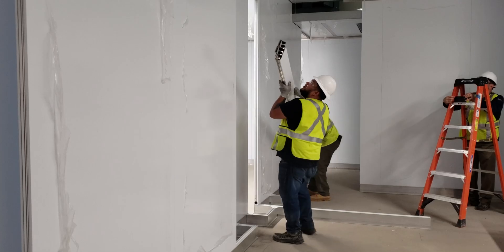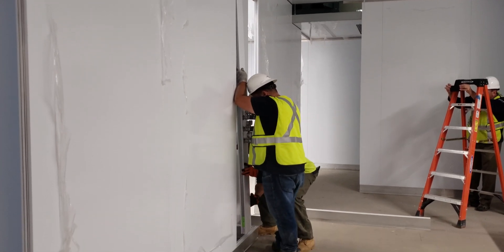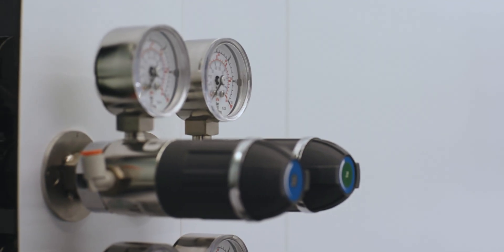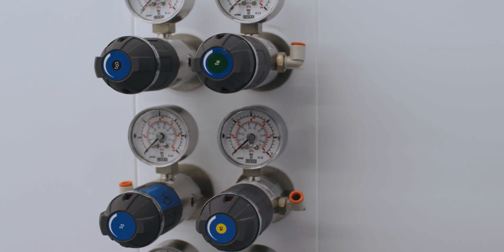The AES Omni is a pre-piped, pre-manufactured, pre-tested supplement to our wall system that reduces errors in the field and speeds installation. Because of our skilled labor force, we were ahead of schedule — but the real key is the Omni. It simplifies the installation to the point where we drove the schedule approximately a month ahead.